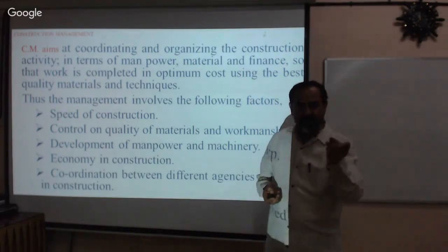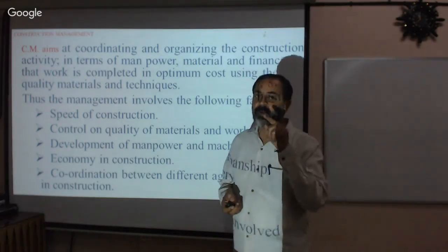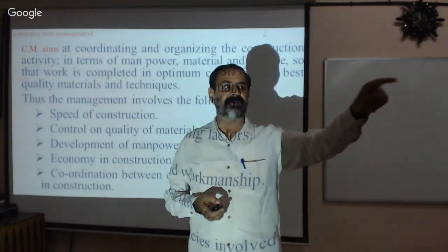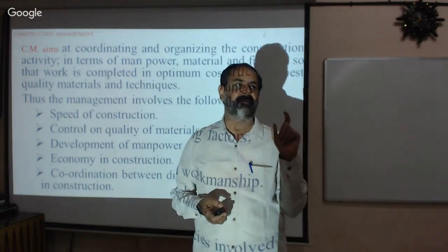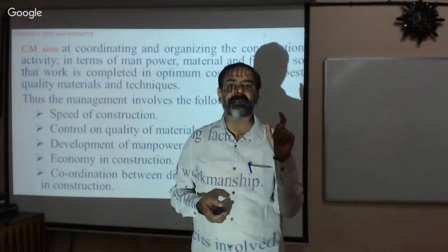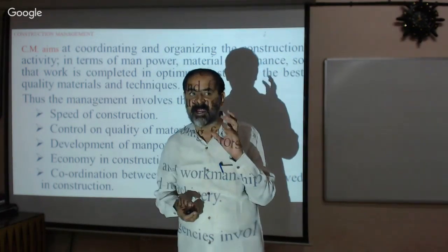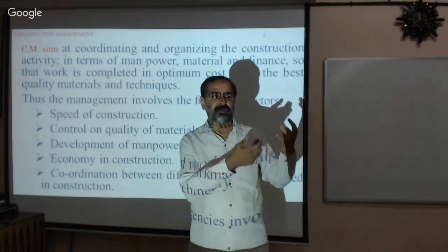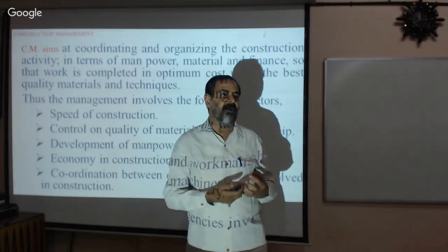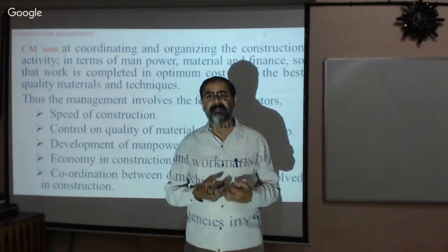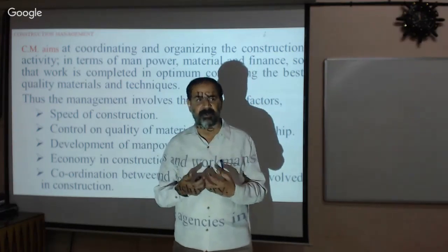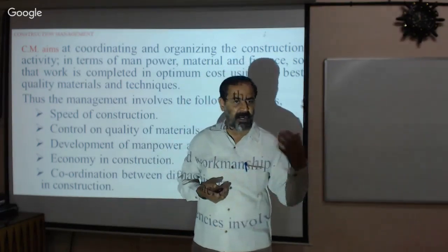Therefore, order and get the material. But you are the master, you must tell the concrete manufacturer what material to give. Who has to decide what kind of material you want? You need to say, I want this quality of concrete, this minimum cement content, the slump is so much, and the water cement ratio is so much. You need to order that to them.